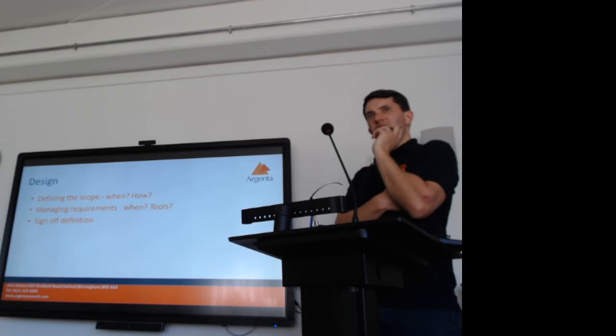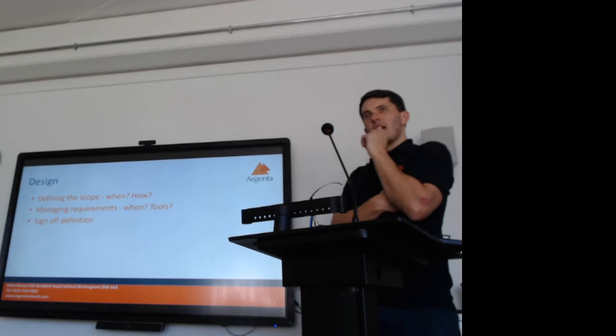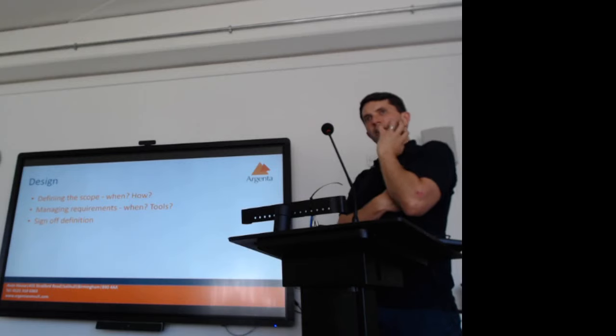Requirements do still get added, but at the end of the first stage, when we sign off the requirements document, we put solid timings in place, which really makes people think before they make a change that's going to affect those times. It has to go through a kind of review to actually make a change to the spec.